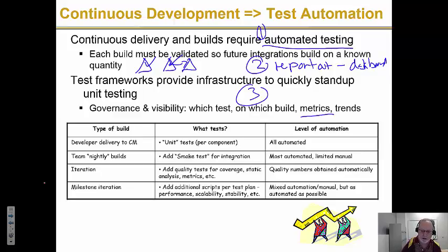When would you see and react? Hey, guess what? You've got a daily stand-up. You run the build overnight. You run the integration and test overnight. The first thing you should check, maybe even before the Scrum board, is your quality dashboard, and see what it looks like. See if anybody broke the build. We'll talk about that.